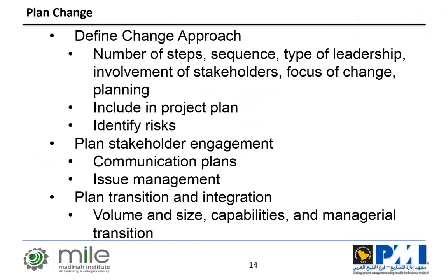And of course, as a good PM, you will go back and identify risks specific to the change. I have seen some methodologies where you have two risk registers, one for your project and one for your change management. That's probably a good practice when you have very complex changes, or changes that are more demanding on your workload and your different work streams than your typical smaller change. So you would like to identify risks that are directly linked to, and probably owned by, the change management work package.